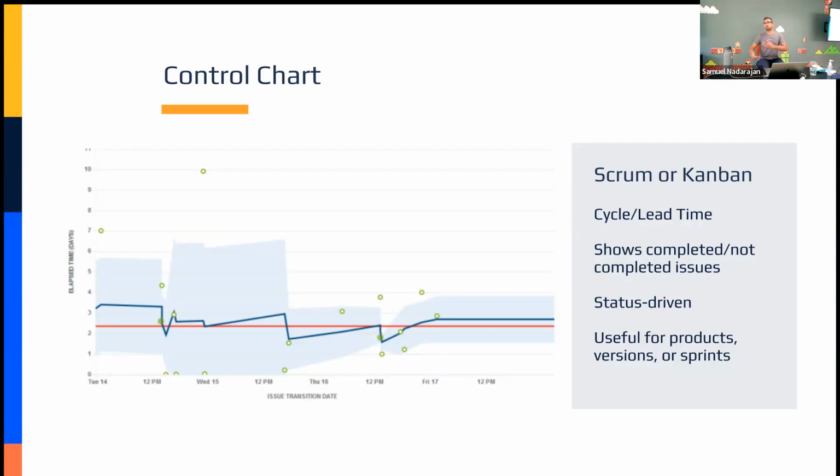So that'll help you decide, like, okay, if I create this issue right now, and my lead time is 2 weeks, then knowing what that lead time is tells me that if I'm creating a bunch of issues right now, I can expect this ticket to go from now to completion in about 2 weeks.